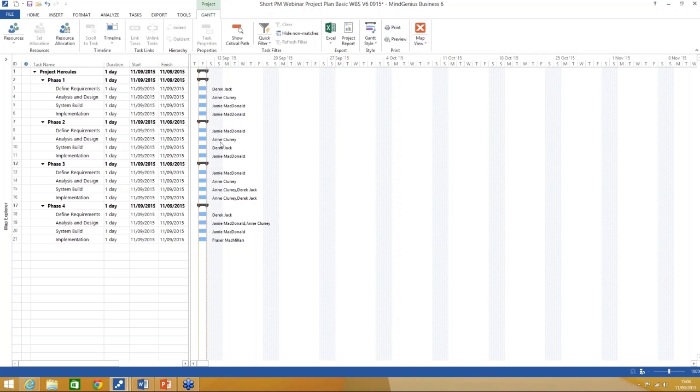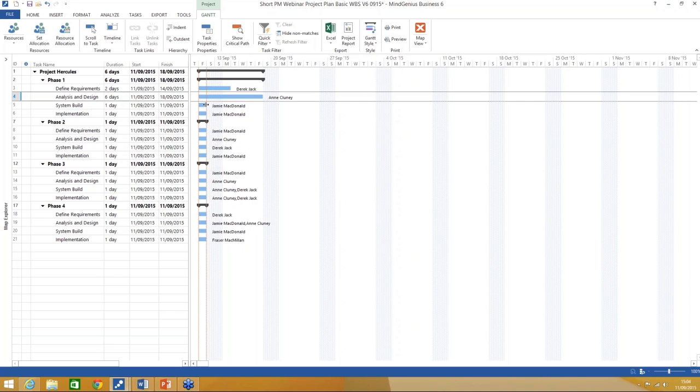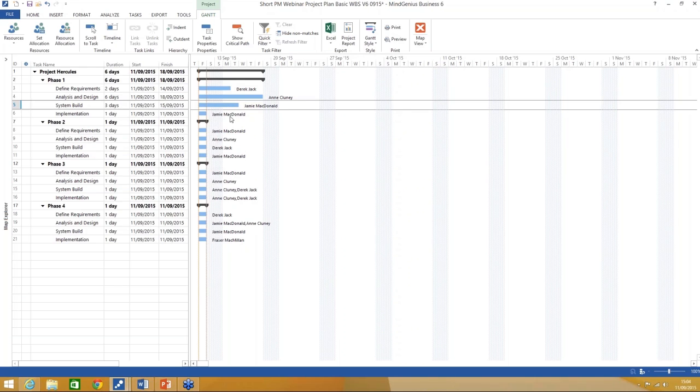So back in the Gantt view, you can now see that the structure of the project schedule is as you would expect, with the parent-child relationships from the map structure being taken forward, giving you a project schedule structure of summary, tasks, and subtasks or activities. We can now look easily and quickly to assign resources if that hadn't been done at the earlier mapping stage, which we have done, and the all-important time estimates or durations, where we can simply move the icons in terms of how long a task takes.